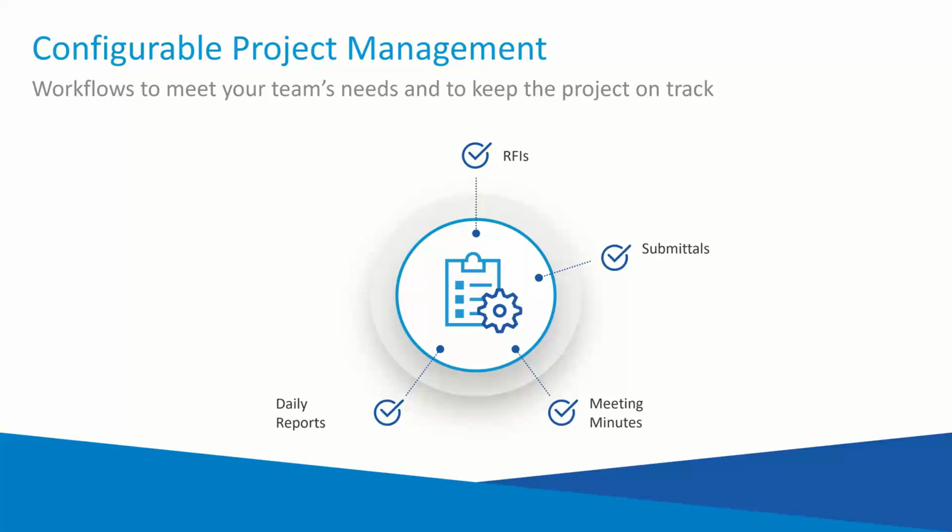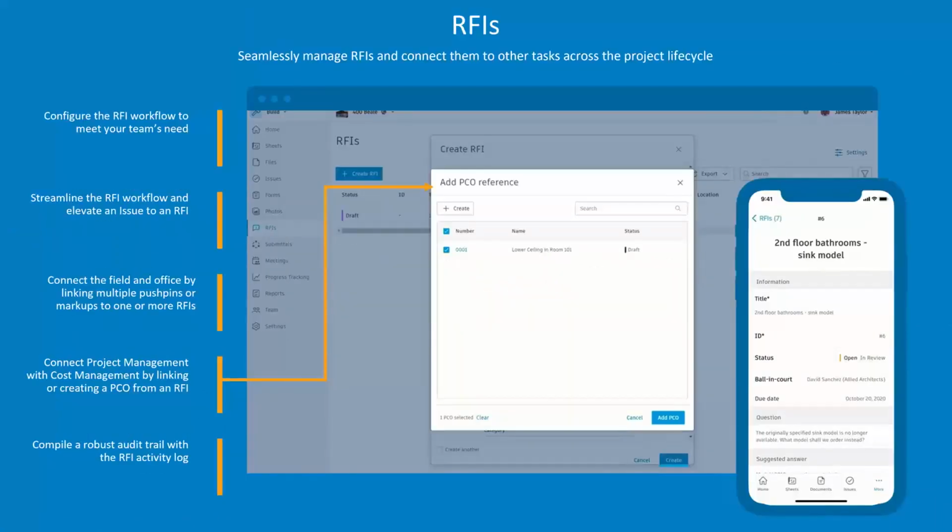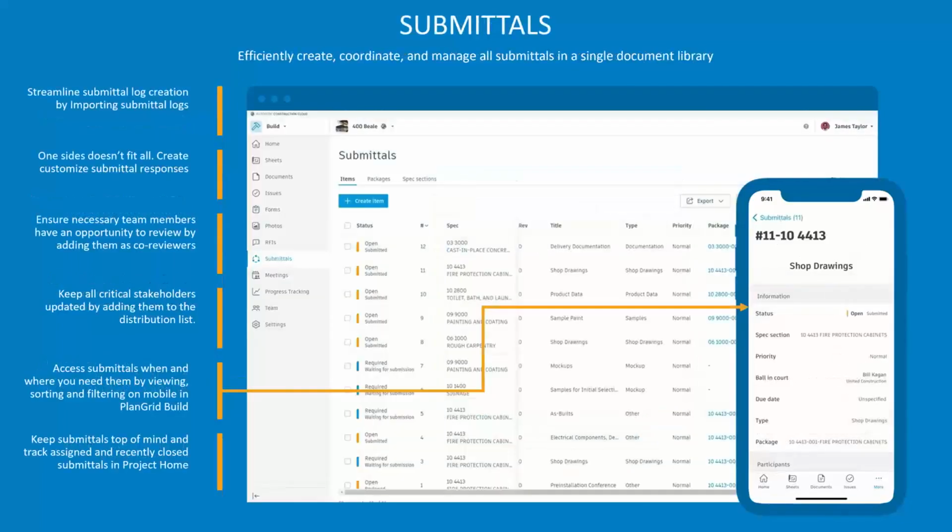Meeting minutes. So now you can track all your meeting minutes within the system and track all the individual items within every meeting in one comprehensive location. We have, as I said before, comprehensive and workflow-designed RFI management, where you have defined managers, defined reviewers, defined co-reviewers and such, and it must go through a particular process and walks you through the different stages of that RFI. Same with a submittal. There's going to be a submittal manager, and either they can assign submittal items to subtrades, or subtrades can create their own submittals and send them in as part of your contractual agreements.